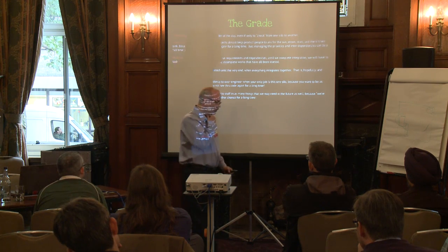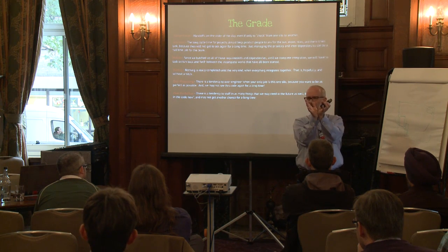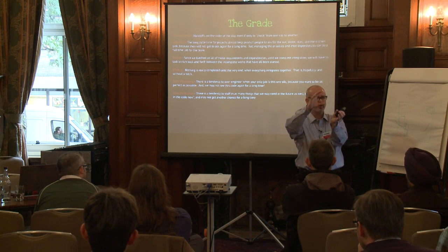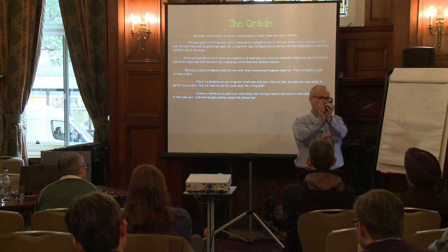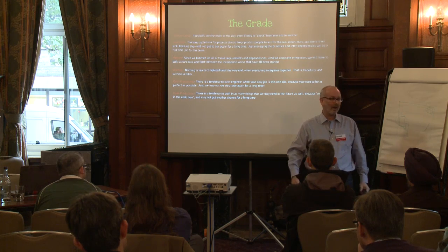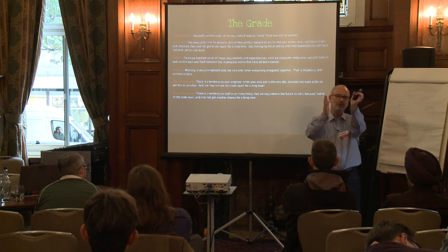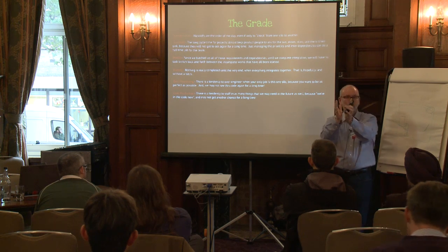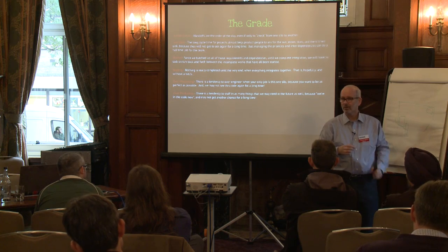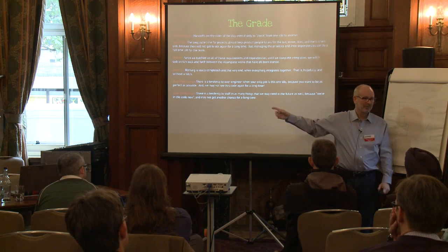Most famous of those is from the Standish reports, right? This follows the Pareto principle pretty tightly. About 20% of the features that we do are actually the ones that people use all the time. The other 80% are not. The statistic that most people cite is that used all the time and used frequently forms around 1/3 of the features that we do. Well, the 2/3 of the stuff is overproduction, right?